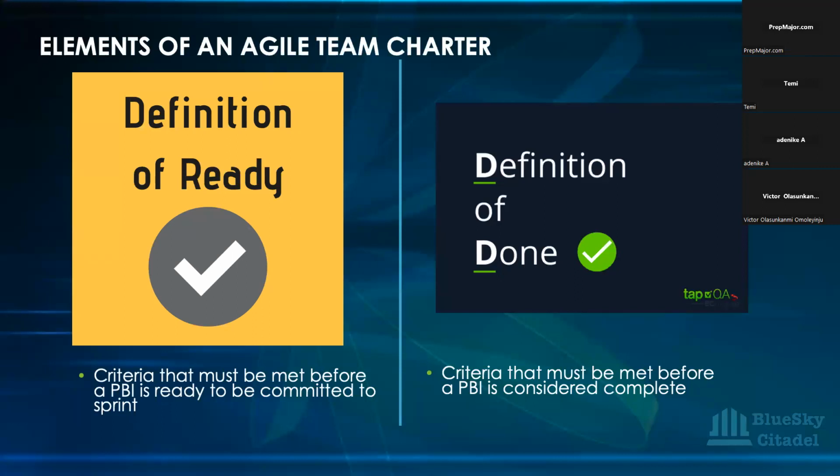You did not analyze it to know who you are depending on, and whether that person is ready in that sprint to help you with that particular story. So then you are blocked. At the end of the day, when you close your sprint, you committed 20 but are able to do maybe only 5. Then you are not true to your commitment. You have to start explaining to your stakeholders that we told you we'd do 20, but now we did 5. That's because when you started your sprint, the team had not effectively analyzed the product backlog items to understand what was needed for those tasks. Again, it affects your commitment reliability and the way your stakeholders see you.